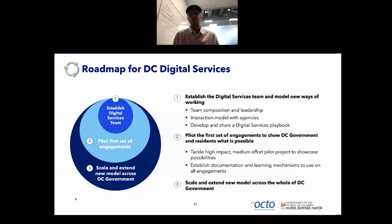So all of our paving plans are put in there. Through our LRS, each block is isolated and highlighted, and each block is given a status and a condition. And as they pave, they literally block by block change the condition, change the status from under construction to complete. And so that map is live every day that you come and look at it. You're going to see a different configuration of what's active on the street and what's not.